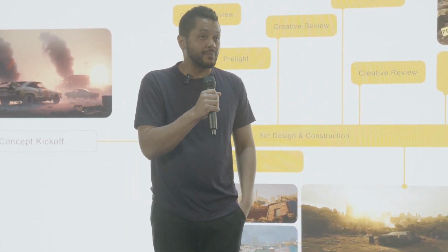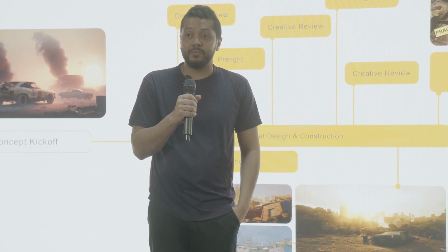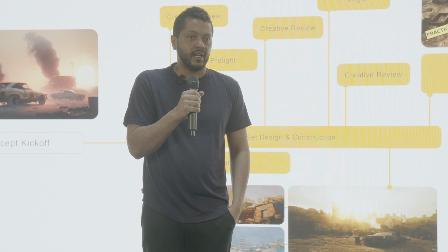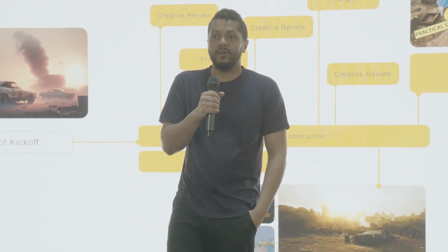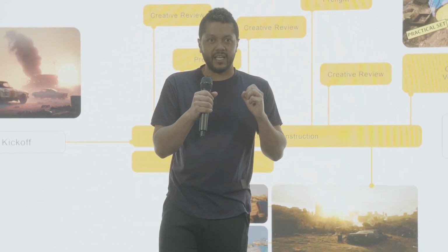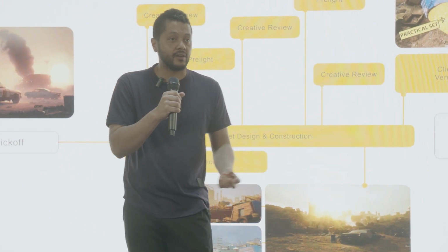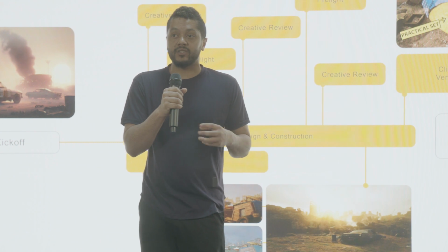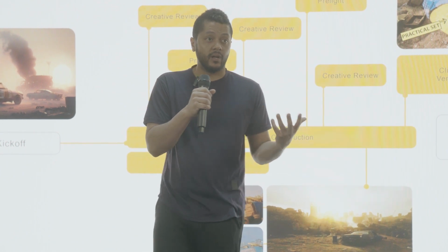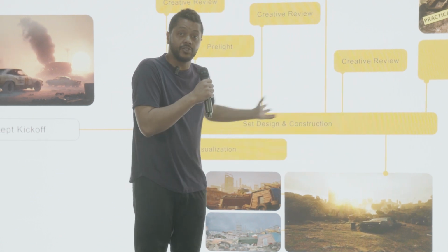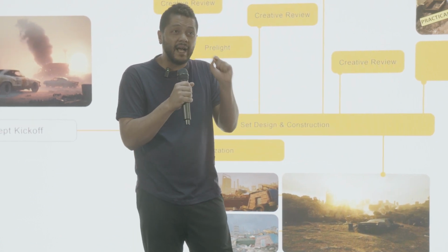So before this process existed, Previs was using assets that were just stand-ins. And so you couldn't really budget out those worlds exactly as they would because you didn't have the input from the production designer, the set decorators, the DPs, right? So all of a sudden, when you have those people involved, there's a step between this design stage and the construction stage where you can budget out every element.